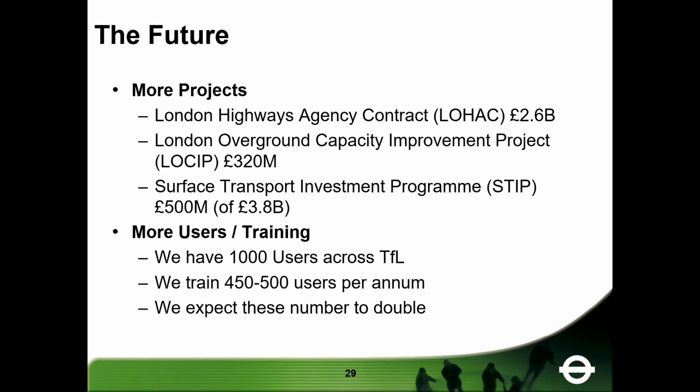So as I mentioned, we've got the London Highways Agency contract, and they are rapidly expanding that to manage more and more of their processes. Applications for payment are all made through the platform, and the payments are made and certified through the platform, making it easier for them to match up and reconcile their cost breakdowns with what they're actually paying their supply chain on a month-to-month basis, making sure that programs are running on time, reducing the risks and the costs for all of their projects.